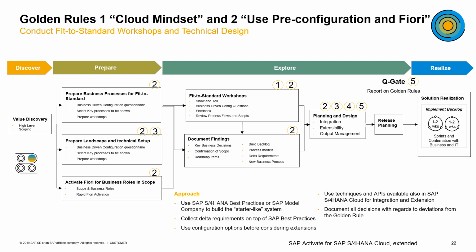One of the foundations for the Fit to Standard is to show the system live. When you show the system live, you get pre-configured data for the show and tell. The data is designed for a manufacturing company as an example. It is recommended to go through the steps before the Fit to Standard workshop starts so that it makes sense to the customer as they're going through the process.